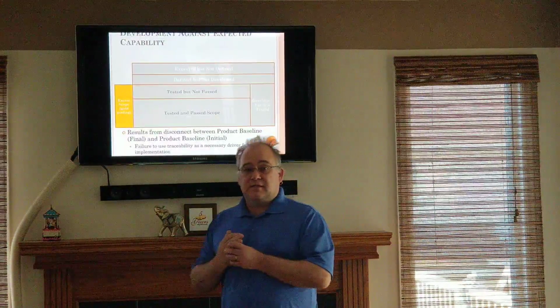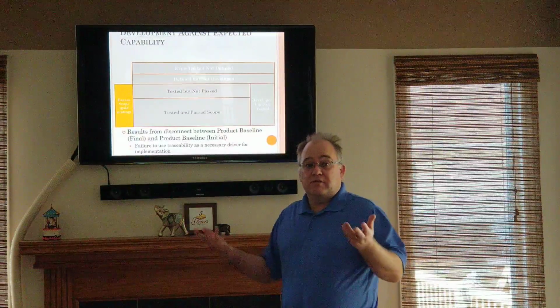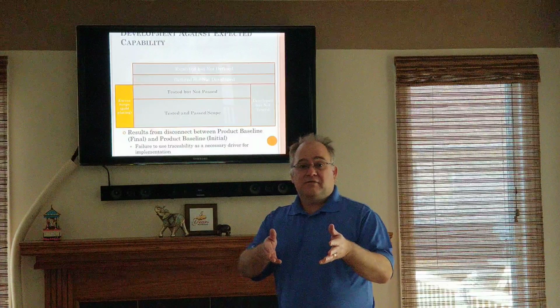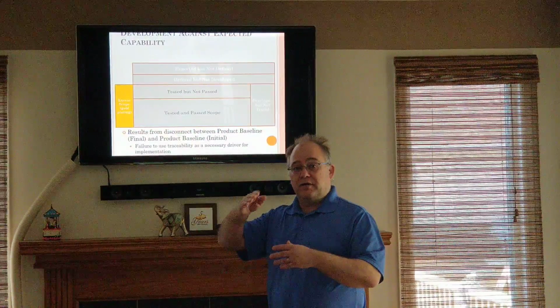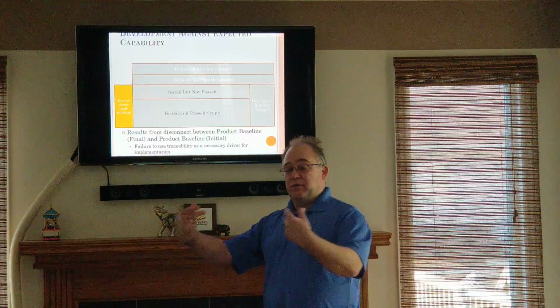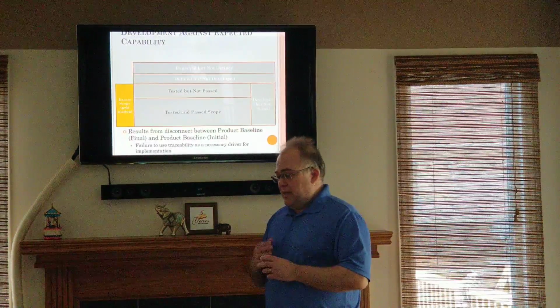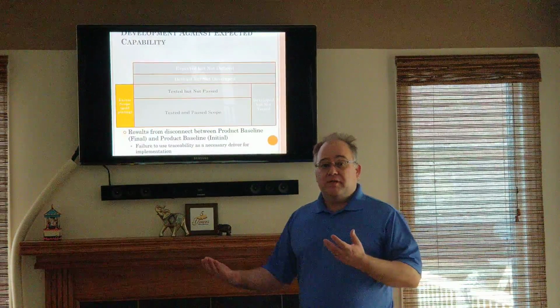And in many cases, as I said many times, this is actually a team that's trying to give a little bit more. They've seen an opportunity and they've said, okay, hey, we can add this capability as well. The problem is it hasn't been coordinated through the design authority to make sure that it aligns with all the other development teams that will later be integrating their products. And in addition, it's not tested because the test team doesn't even know it exists.